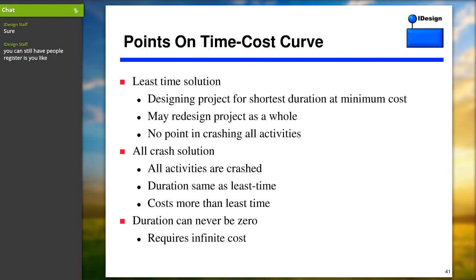Now, as you crash it, the critical path gets shorter. What do you do now? You pick another activity on the critical path and you crash that one, the second best candidate. What happens now? The critical path again gets shorter. As you keep shortening the critical path, at some point the critical path may no longer be the critical path, because another path that you didn't apply any crashing love so far now becomes the longest in the project, at which point you stop and you jump to that one and you crash activities over there.